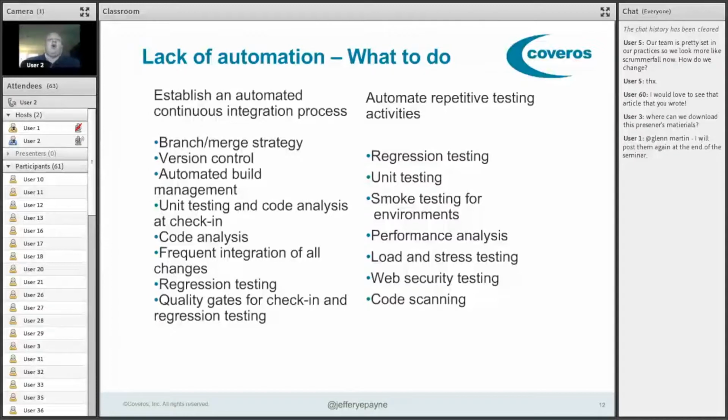And that means automating your regression tests. You initially probably don't have any automated regression tests. That's okay. As you start building tests in your sprint, some amount of time needs to be spent automating those tests. So you're starting to increase and create a regression suite that you can run every day to make sure things that used to work still work.